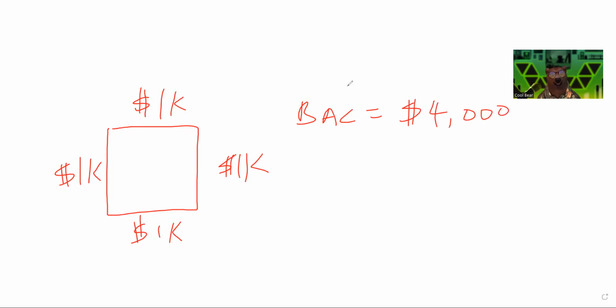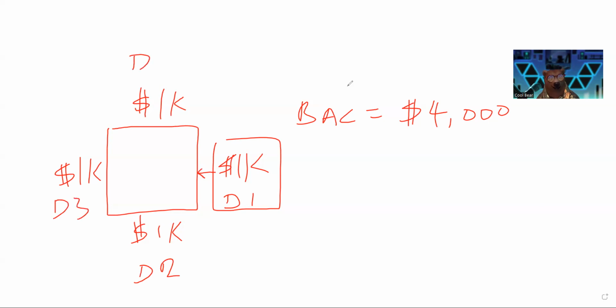But when we look at earned value, we don't just look at the big old $4,000. We got to imagine the passage of time. And what that means is on day one, I'm going to paint this side of the fence and build it. Day two, that side. Day three, that side, and day four, that side. We now have a new metric. This metric is called planned value.